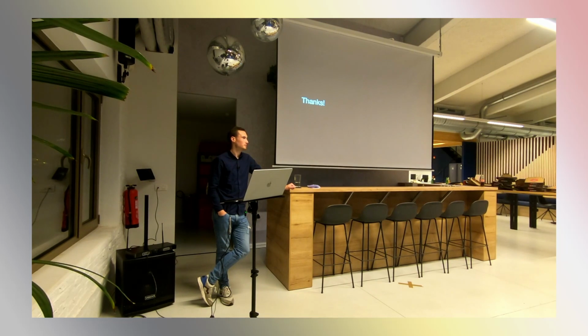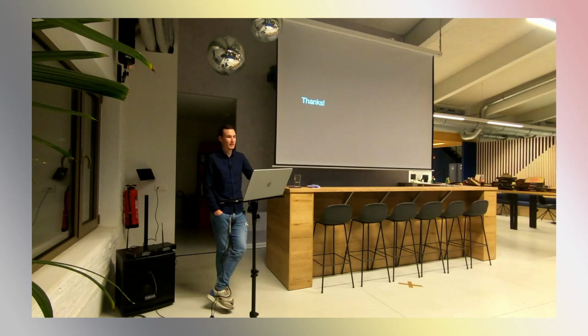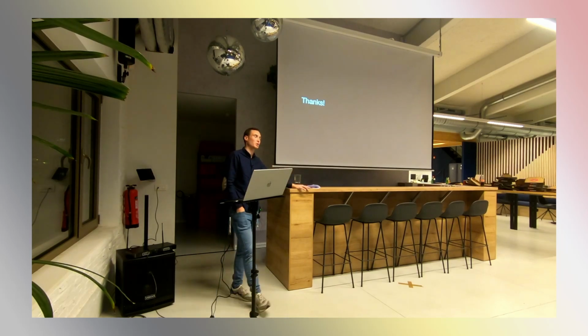Can you change the offer? If you made the offer with a velocity of 4.5 and then you start and you see it's 3 because of the client, then we end up most of the times scratching some features if it's depending on external behavior, like from the client side, or changing requirements. If it's on our end, we tend to push our developers a little bit more to increase velocity.